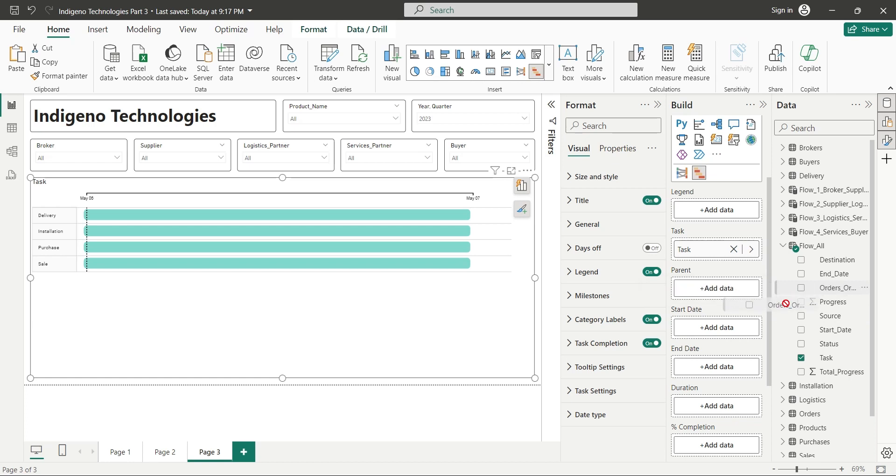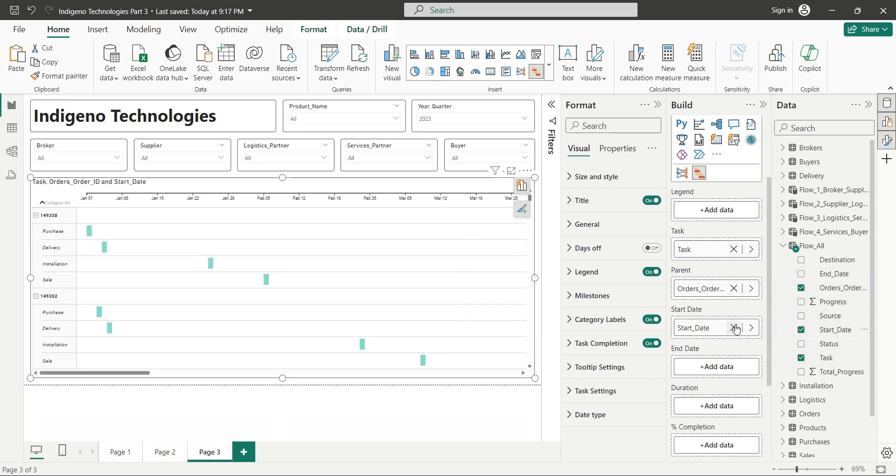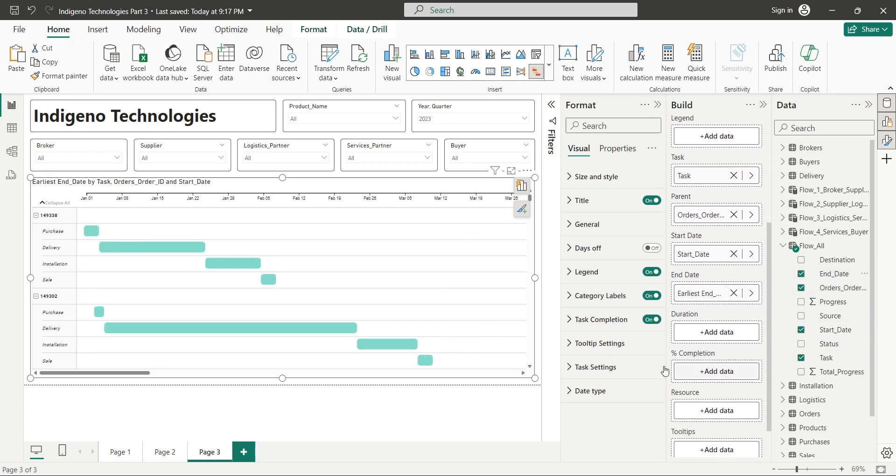We will add the product ID field to the parent to show product-wise information. Now we will add the start date field to the start date. And the end date field to the end date. In the percent completion, we will add the progress field.